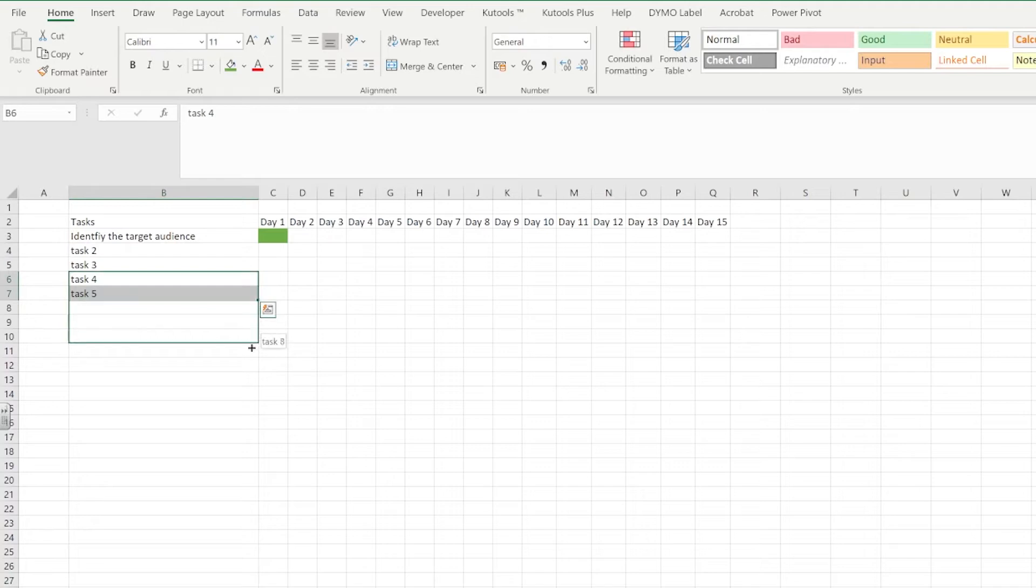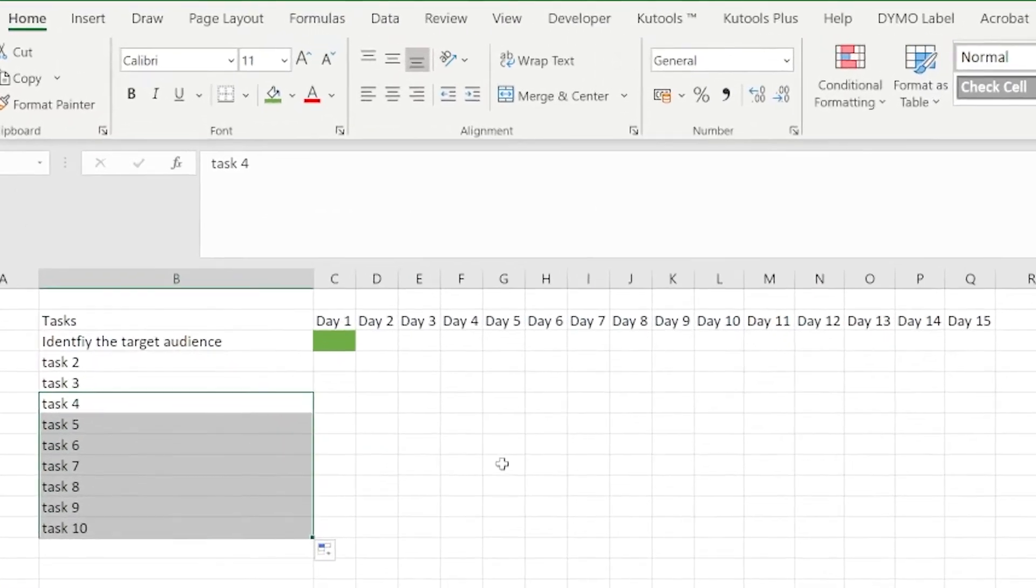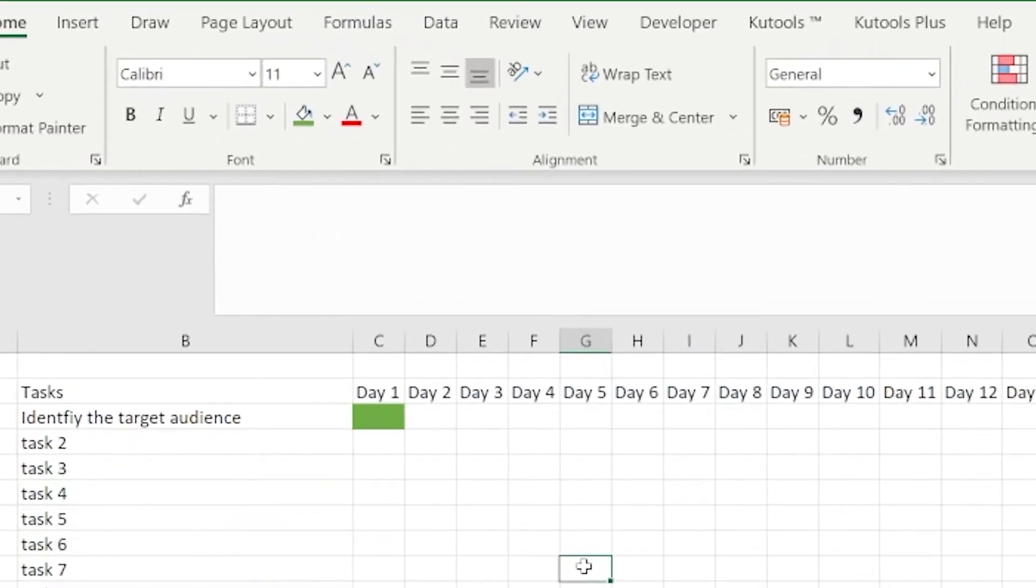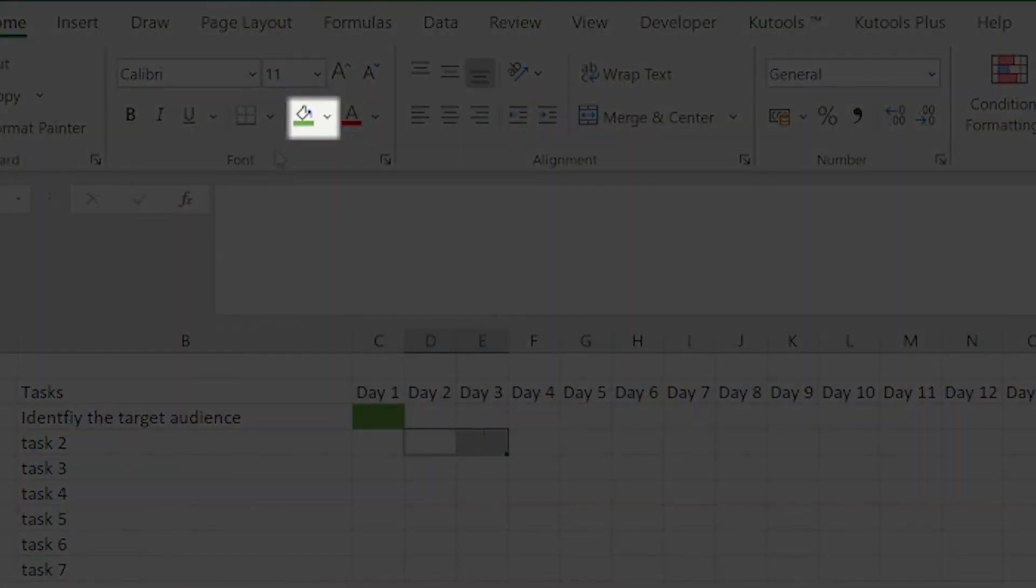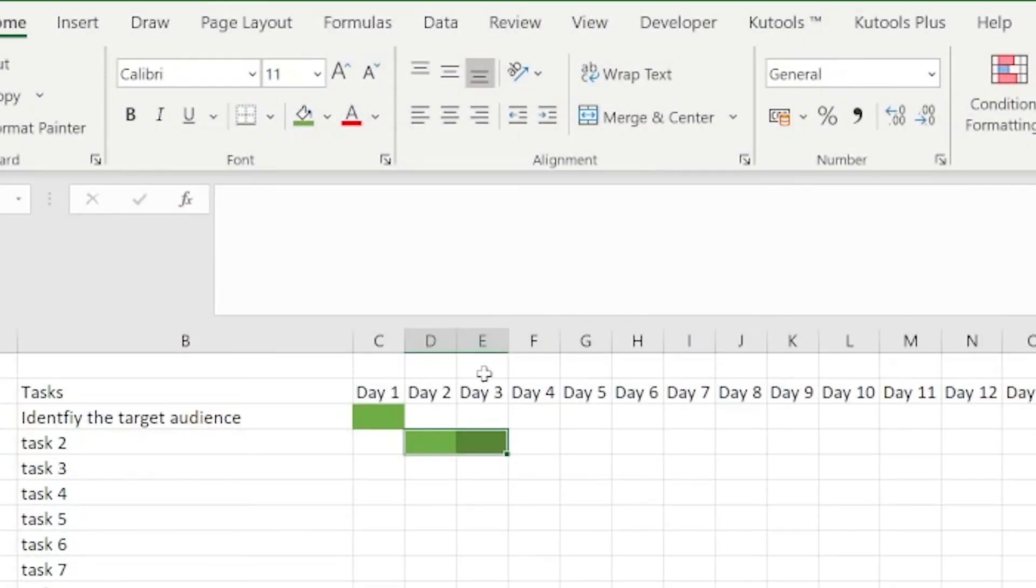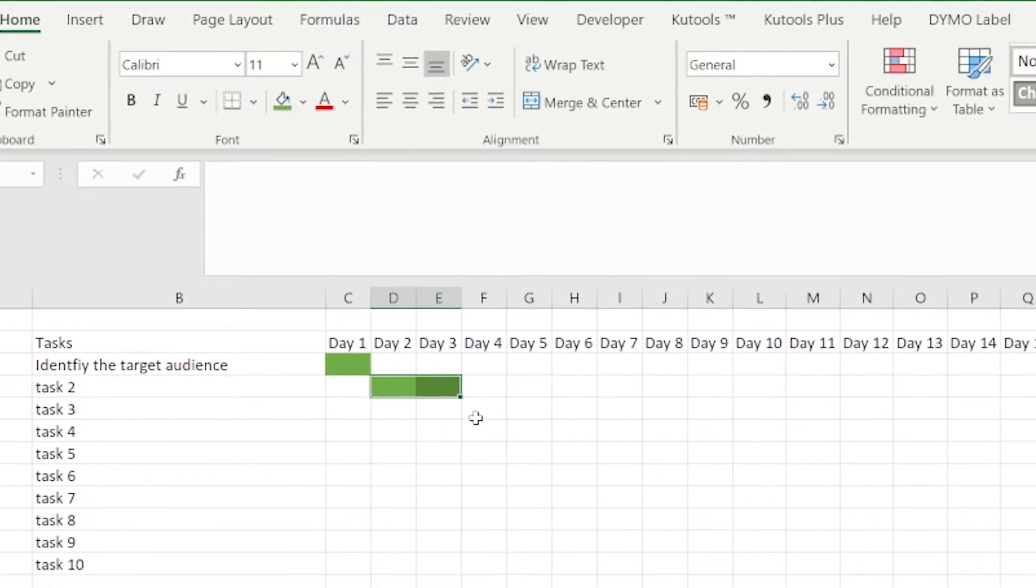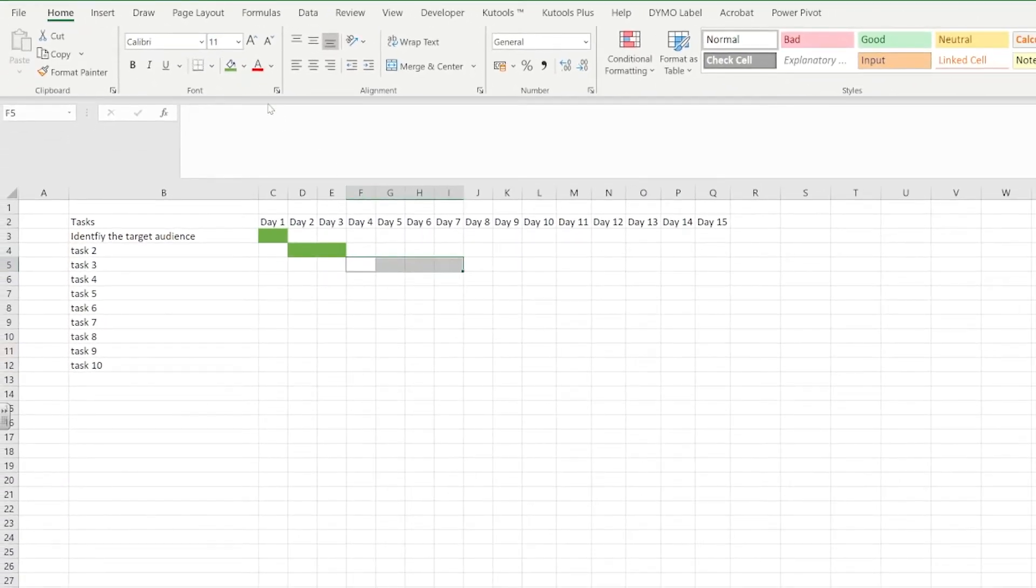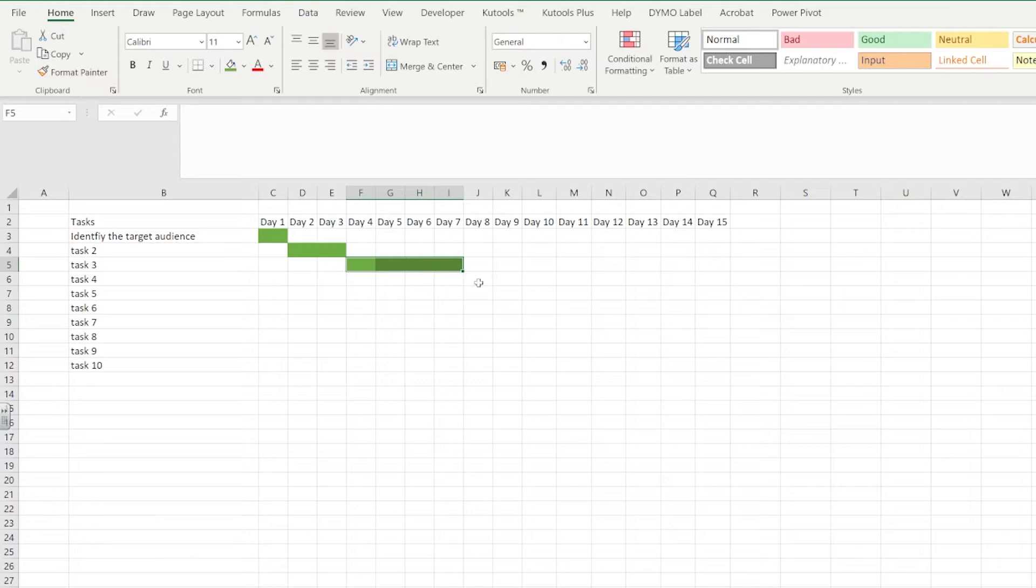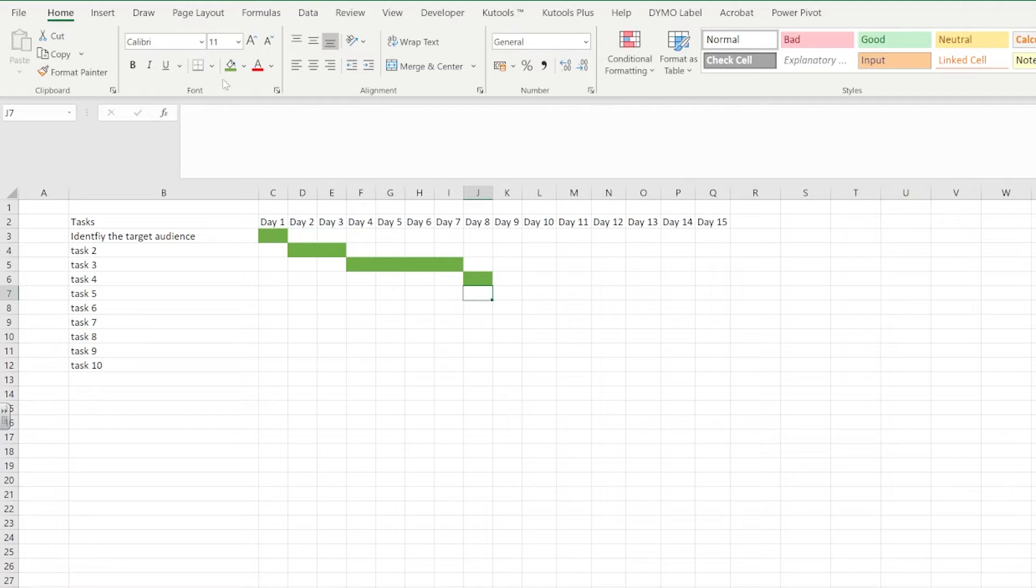Next we're going to use the paint bucket tool. Now the paint bucket tool will allow us to fill in the colors inside of certain cells. What we're trying to do here is represent how much time we expect those tasks to take us. So I expect the identification of the target audience to only take one day, but task two might take me two days to do. So therefore obviously we've got day two and day three.